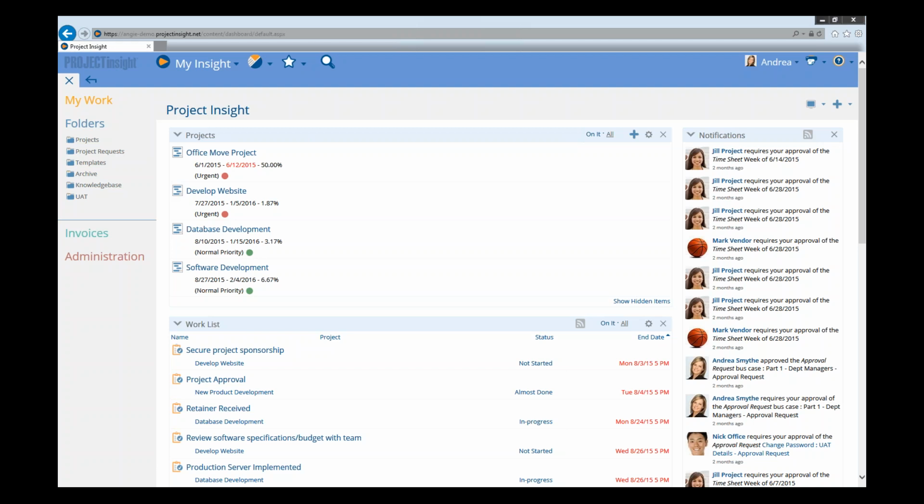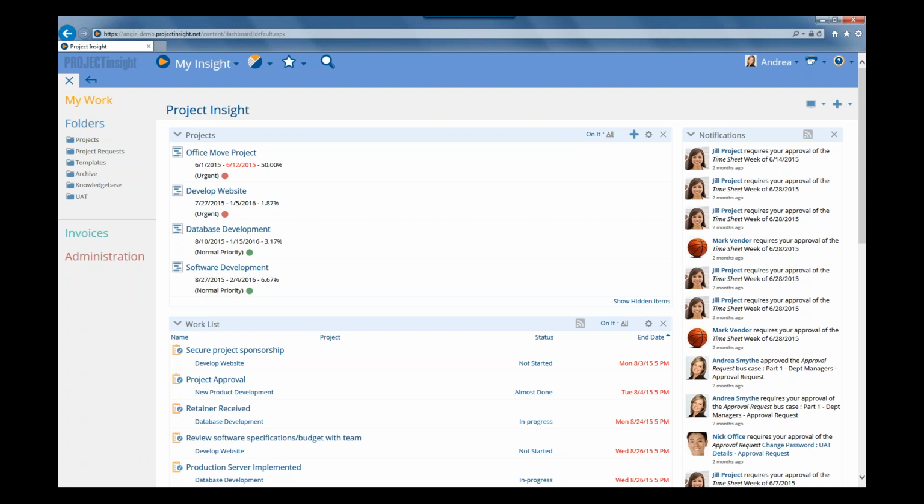All right, so baselines is what we're going to talk about first in our session today. A project baseline is used to measure how performance of your project deviates from your original plans. Your performance measurement is only going to be meaningful if you have an accurate baseline. A project baseline is defined as the original scope, cost, and schedule. And a project baseline must be completely defined and documented before the project execution and control activities can begin.